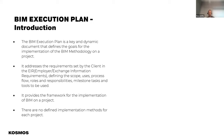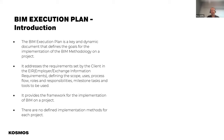The EIR is a macro document that sits with the employer, defining requirements at a very high level. The BIM execution plan sits underneath that — it takes those requirements and develops them further for the project itself. What's important is defining the scope, uses, process flows, roles and responsibilities — all of this needs to be defined in relation to data management, data exchange, what stakeholders will be on the project through the lifecycle, and how that information will be used. It's the entire framework for the implementation of BIM on a project. There are standards out there — on the RAI, SCSI — and there's a document on the SCSI website: 'BIM Implementation for Quantity Surveyors', a step-by-step process well worth reading.